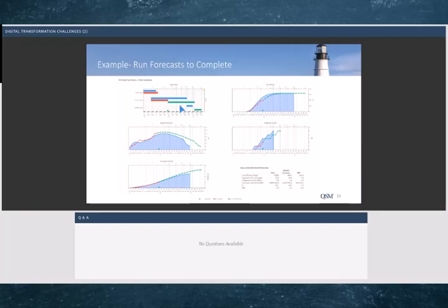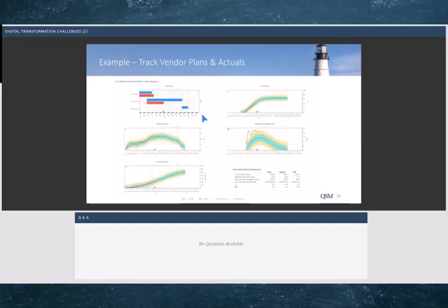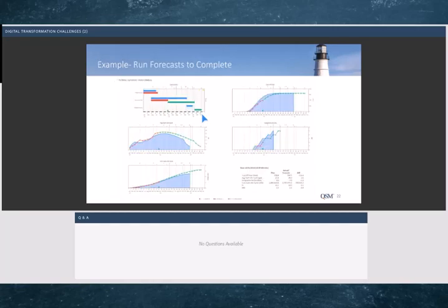So this estimate validates what we just saw on the previous slide, that they're going to be late, right? So now we can see they're going to be late on schedule, late on delivery. Staffing and costs look okay at the moment. So what's actually going on here? They promised they would deliver 508 features. They've only delivered 394. They promised us that we'd spend $2 million on the overall release or delivery. We've already spent almost $2.2 million. So we've actually gone over budget already. And with this Slim Control analysis, it lets us see that midway through to hopefully save us a lot of money in the long run.